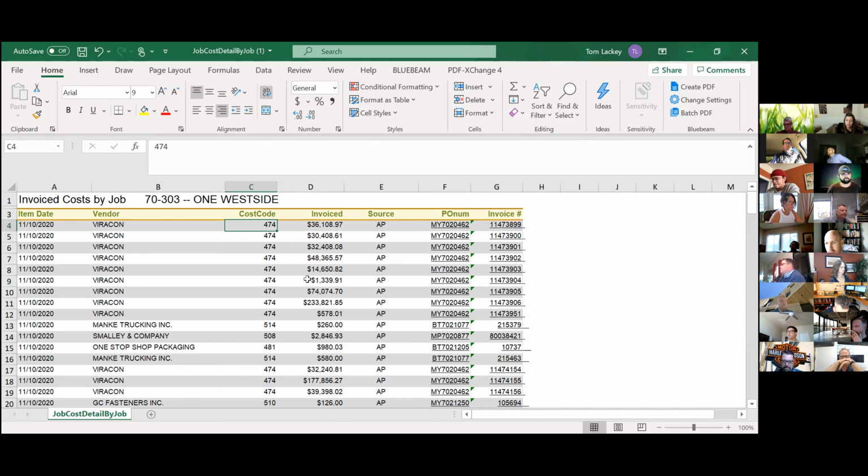And then when everything goes out to the field, that's when you bill the rest. Yeah, you bill the balance, like normal. If you've got a job that has a 28% margin on it and you're only billing 20%, obviously that line item in your G703 isn't going to be billed 100%. So when you ship it out to the job, you bill the balance. Okay. Just wanted to see if that was changing.